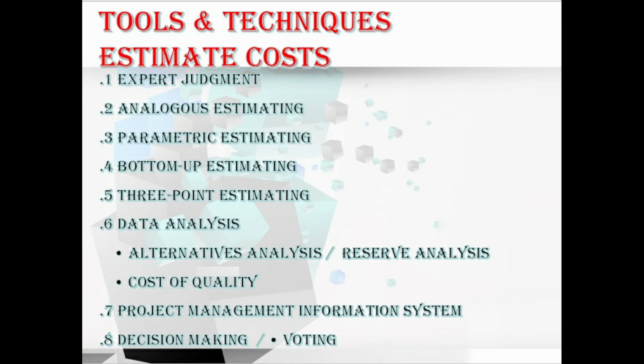In this case, we know we have the contingency reserves and the management reserves. Contingency reserves are for the known risks, which are specially identified risks, and the management reserves are used to accommodate unknown and unidentified risks. Okay, fine. Hope you understand these two data analysis techniques.